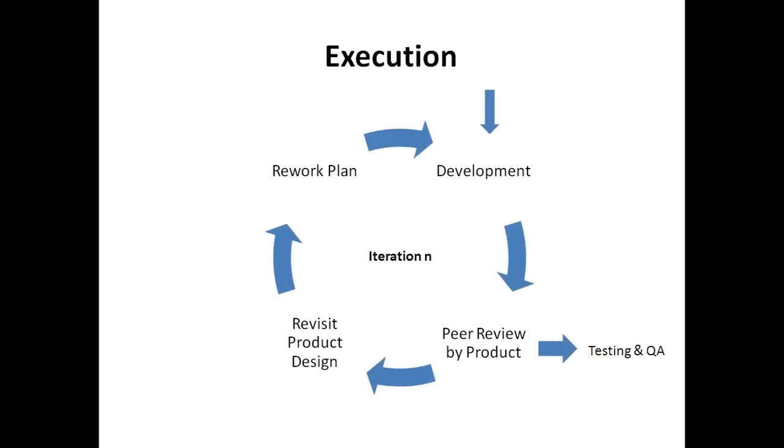Now, in the beginning of explaining all of this, I said that we need to have the design as an input into the iterations. Theoretically, an iteration-based model does not stringently say that we need to have a design ready. This is something that we generally do, the reason being it puts an upper limit on the number of iterations needed. Because if you have like 80% of your design thought out in your mind, then it's seen in practice that you won't be getting back too many comments for change from the product team. But if you try to iterate a lot on design itself, then you will just be stuck in this iteration cycle for God knows how long.